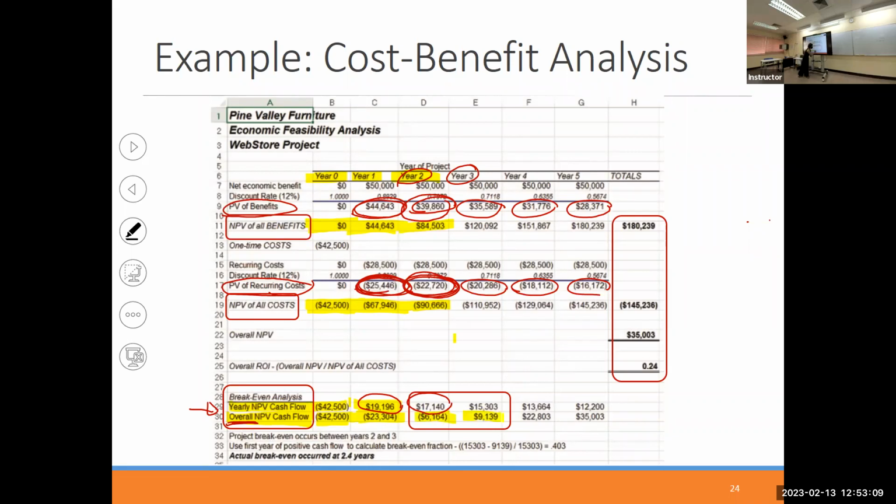You start to gain. That means the overall project investment starts to get profit between year 2 and 3. This is the division that you start to get profit in terms of overall. Okay, you pay the cost 110 while the benefit is 120. You start to gain now.